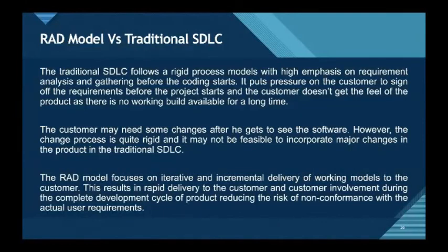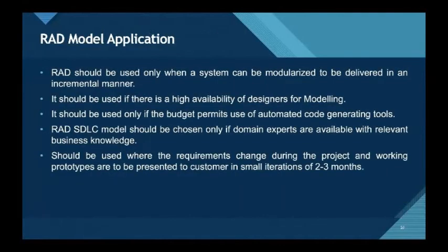and it may not be feasible to incorporate major changes in the product in the traditional SDLC. The RAD model focuses on iterative and incremental delivery of working models to the customer. So this results in rapid delivery to the customer and customer involvement during the complete development cycle of the product, reducing the risk of non-conformance with the actual user requirements.